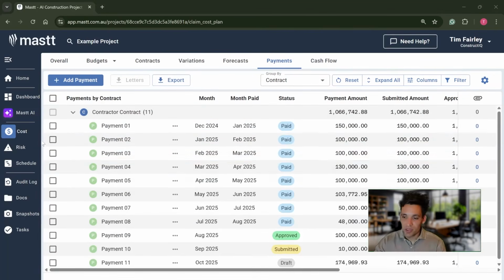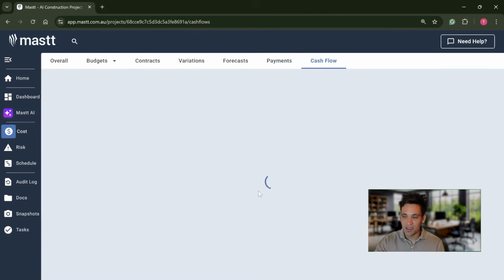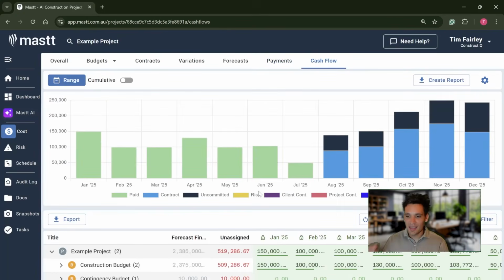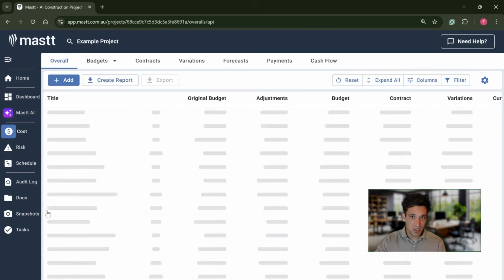Each month from our subcontractors, while they're on site and doing work, we'll receive payment claims. When we look at all the payment claims we've received from the 3, 4, 5, 6, whatever subcontractors working on site, we sum those together, we get our total cash outgoings for a certain month, and we can sum that over time to get our cumulative total cash outgoings.